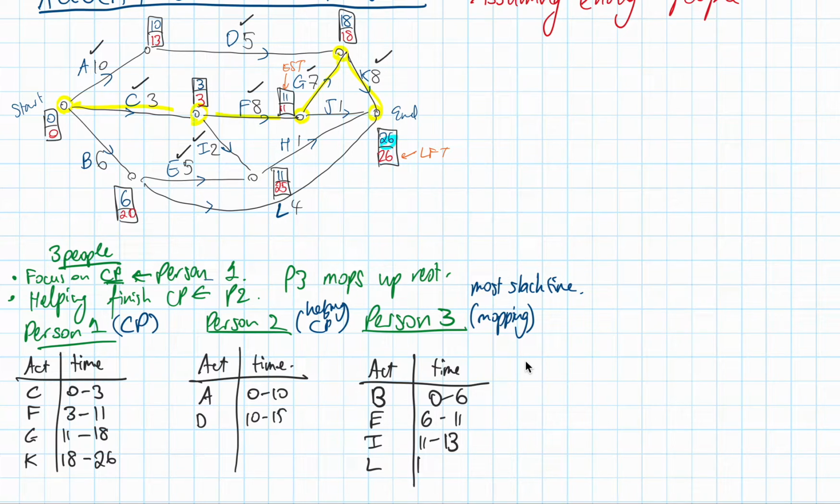Okay. Now, with job L complete, we can see that person 2 is caught up, and we can still see that this other person, that's taken person 1 26 hours, so they've got no time left. So let's go back to person 2. What could person 2 do? What's been done so far? Well, job B's been done. Job E, job I, job L. I guess could do job H. Just takes 1 hour.